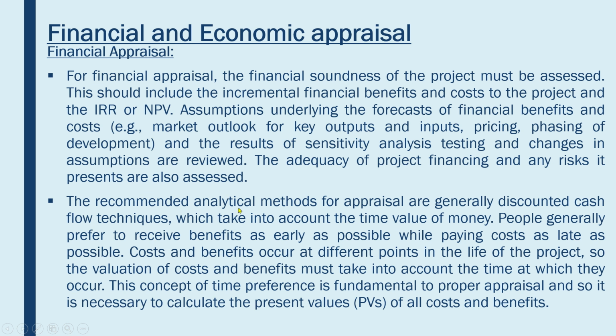The second point, the analytical methods. The recommended analytical methods for appraisal are generally discounted cash flow techniques, which take into account the time value of money. People generally prefer to receive benefits as early as possible. This is very natural, while paying costs as late as possible. Costs and benefits occur at different points in the life of the project, so the valuation of costs and benefits must take into account the time at which they occur. This concept of time preference is fundamental to proper appraisal, and so it is necessary to calculate the present values of all costs and benefits.